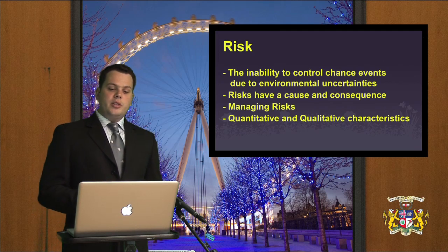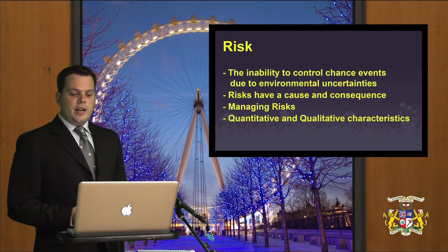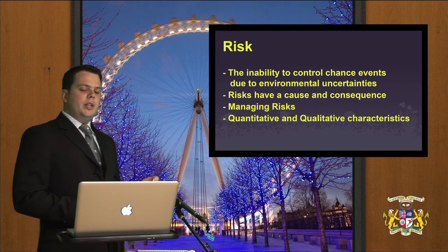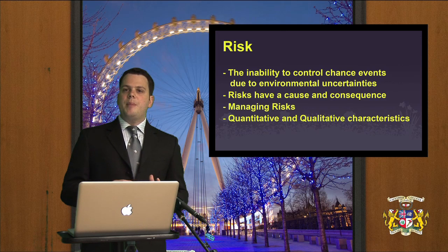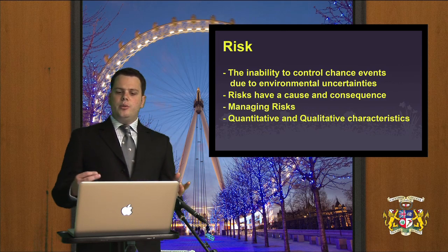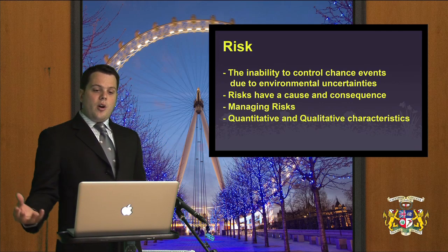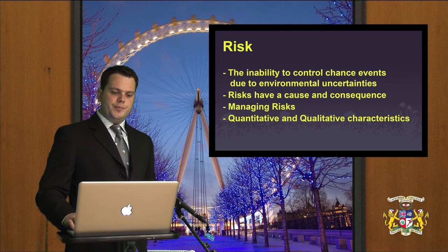Risks have a cause and a consequence, and in order to manage them, you must identify what the specific risks are and then determine the probability of this risk occurring and analyze the impact that it has on the project. You do this by a quantitative assessment of the risk, complemented by qualitative characteristics of the risk.